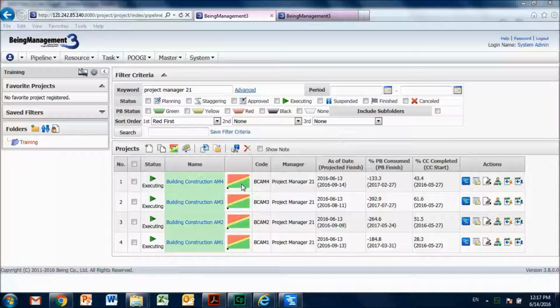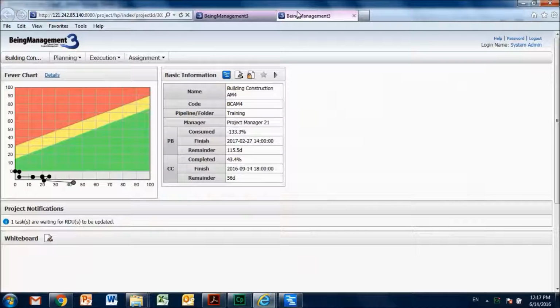I just explained about the fever chart boundaries, and now let me also discuss about how to customize the boundaries of fever chart. So let's go to one typical project. So I'm going to this particular project, I'm clicking it, and this fever chart opens up in another tab in the browser. So as I explained earlier, currently the project is set up in a way the green line runs from 15% when x is 0, and it goes until 75% of the buffer consumption when x is 100.